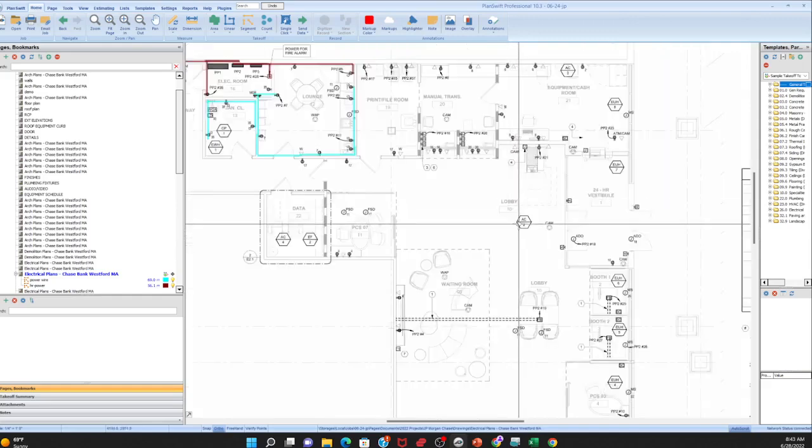When you do the estimate, the first thing you need to do before you even try to put it all together is do all the counts for the lighting, and then send that to your multiple suppliers, because it's going to take them a while to get back with you with the number. I've helped an electrician, and we sent it to 4 people, and we never got them back on time, or we'd get one here or one there.